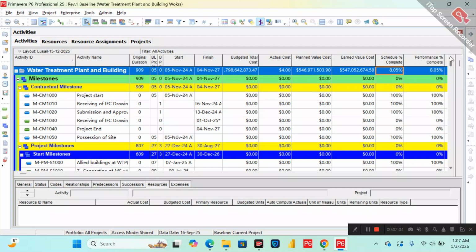There are three categories in which you can load your cost, and there are different implications and complications related to each category. I will discuss the pros and cons of all these three methods in another session. But the most suitable method is to always upload your cost to your work program as budgeted units, so you will never have any issue in your program.